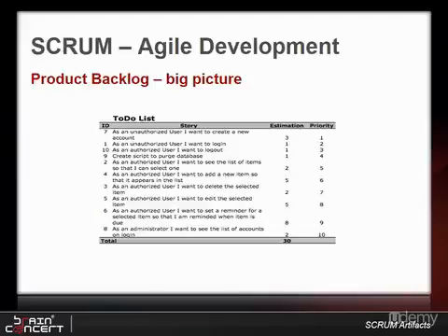This is where it all starts. The product backlog is the heart of Scrum. The first step in Scrum is for the product owner to articulate the product vision. Eventually, this evolves into a refined and prioritized list of features called the product backlog. Things that the customer wants described using the customer terminology. We call these stories or sometimes just backlog items.